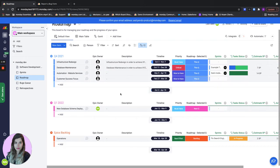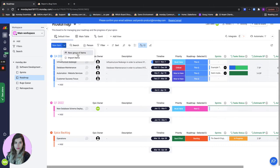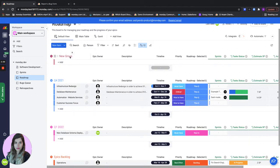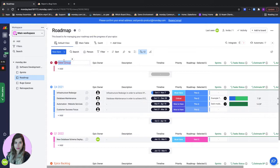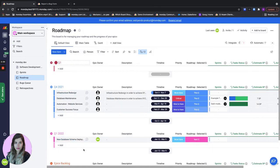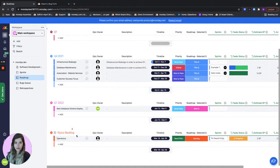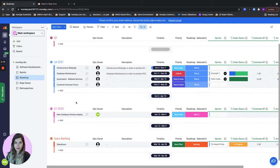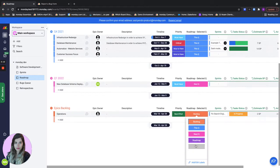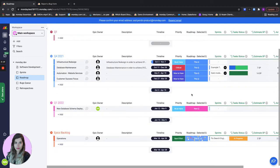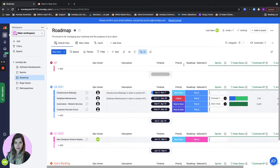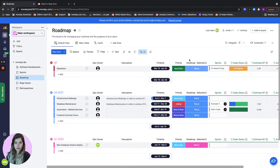Let's say Q4 is done and now I'm planning Q1 for 2022. I'll go here, I'll add a new group of items, I'll call it Q1 and I will start moving epics and I can add new epics to my Q1 group. I will do that by going here and deciding that it's this quarter, since this is my current new quarter it's going to move automatically.